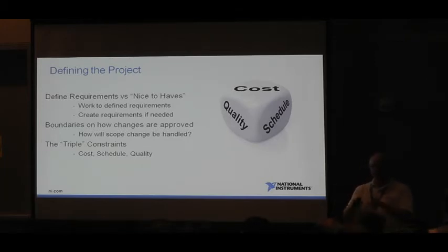When you start that scope creep and going outside those boundaries, as engineers and programmers, I think we want to please the customer. And yeah, I can add that feature. The problem is, we do that at the expense of other things that are possibly requirements in the project, or then your costs start to increase, or you miss your schedule.